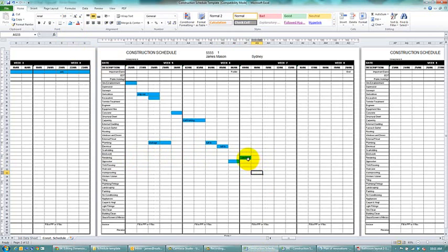Okay. So after that's patched, you're going to want to make sure that the render uses an acrylic render, which means it'll dry within 24 hours and then you can work over the top of it. If they used a cement render, you'd need to leave it at least a week to dry before you can do the waterproofing. So the next thing we're going to do is the actual waterproofing. So we'll come down here after the rendering. Now there's going to be 3 days that we need to take up for the waterproofing. The reason for that is, day 1 would be the first coat, so we just put down there first. Day 2 would be the second coat of membrane, and then day 3 would be drying before anyone could walk on it.